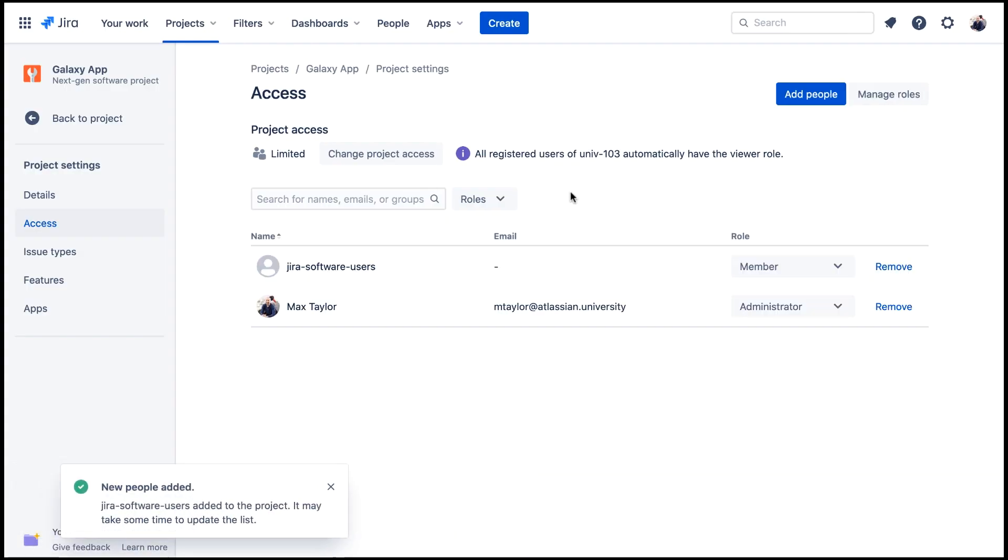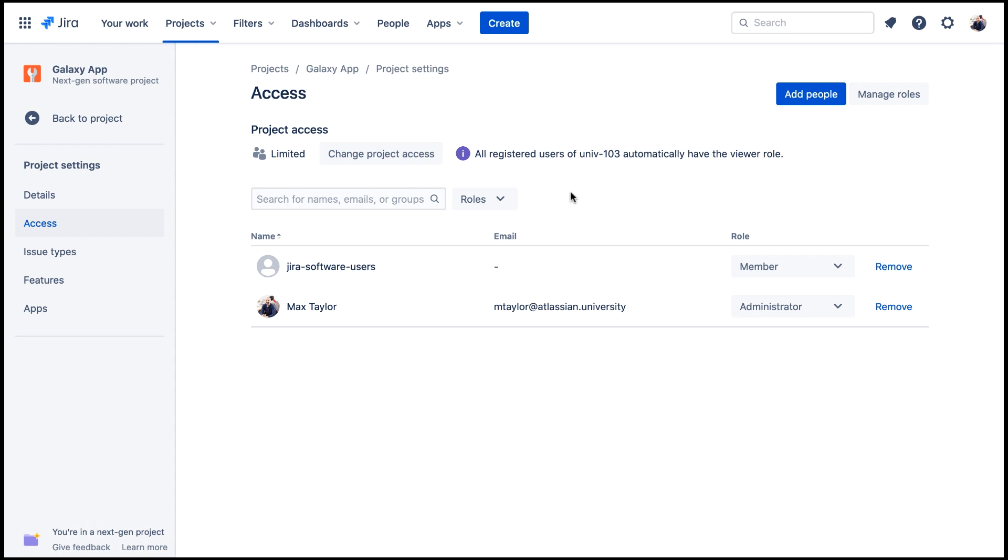Now only users in the JIRA Software Users group can create and edit issues in the project. A user who's not in the JIRA Software Users group can only search for and view issues in this project.